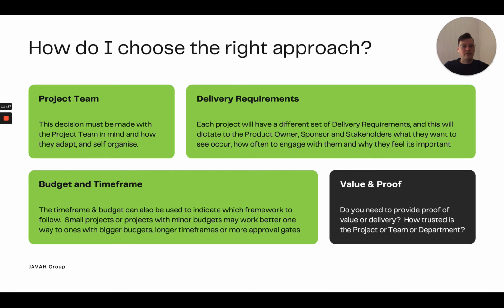And at that point, unfortunately, for this specific IT team, there were no deployments allowed during those periods, and there was just no ability to get anyone from the business to come back and have a look at what we'd actually developed. So we switched to a Kanban methodology with them, which meant that the business could engage with the project team as and when they were available.